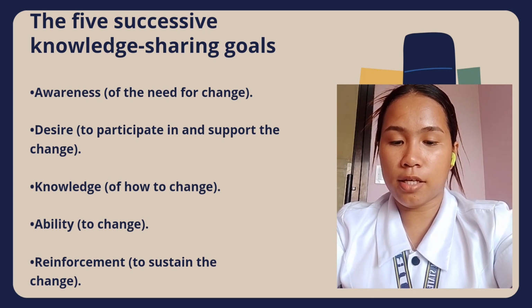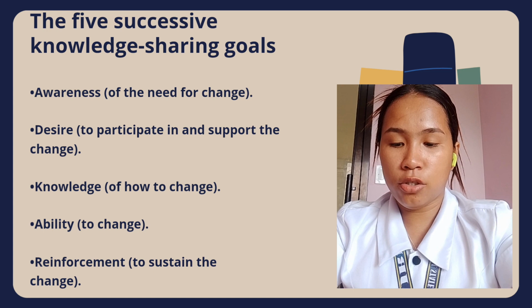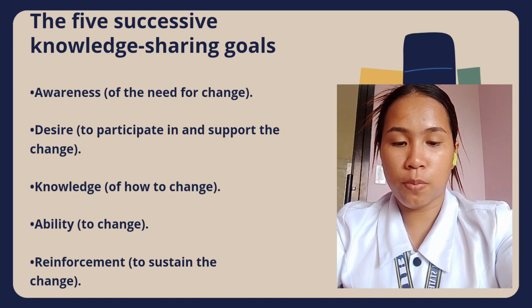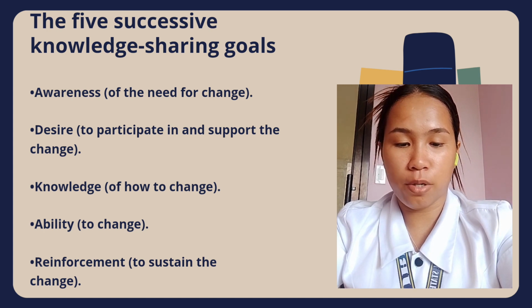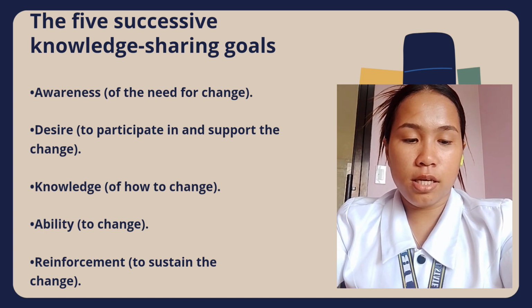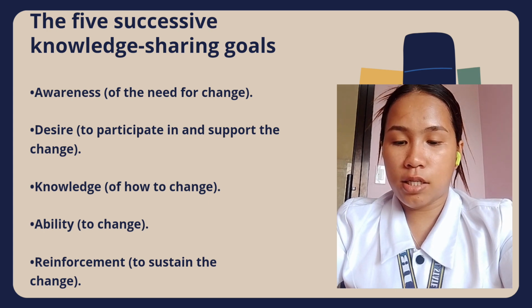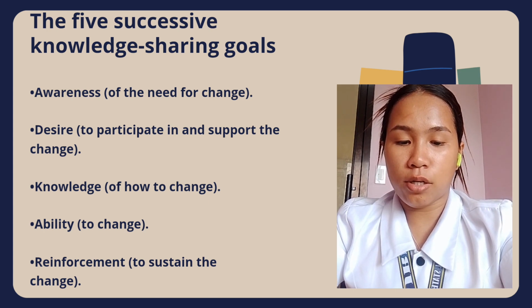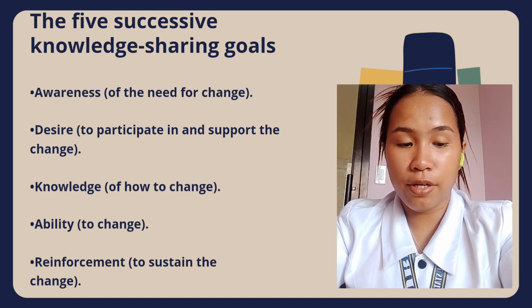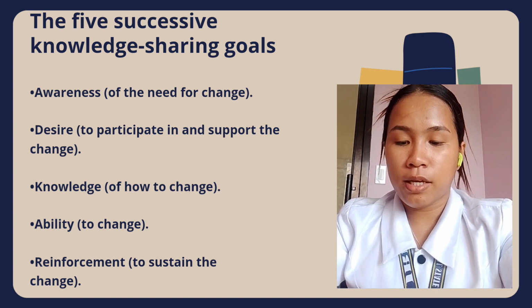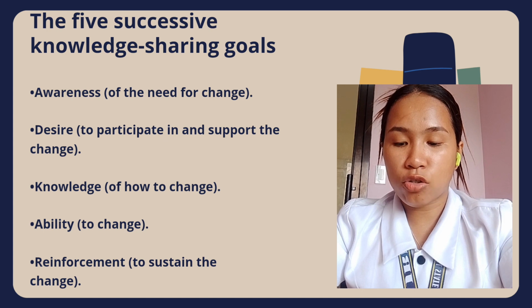Desire to participate and support the change. You need your stakeholders to want to participate in and support the change. You should focus on this goal in parallel with the design phase of your project. This is the time when stakeholders can start to see the detail of what the project will look like, understand the impact it will have, and see the benefits it will bring.